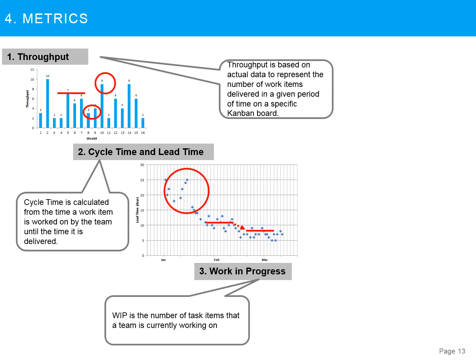The final metric is work in progress. It's basically the number of work items the team is working on concurrently. The goal here is to limit the WIP. Mostly cumulative flow diagrams are used to identify bottlenecks. CFD, or cumulative flow diagrams, show the stability of your process over time. It accumulates and tracks each task that has ever entered or performed at any stage in your workflow.